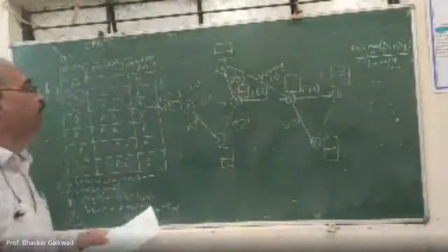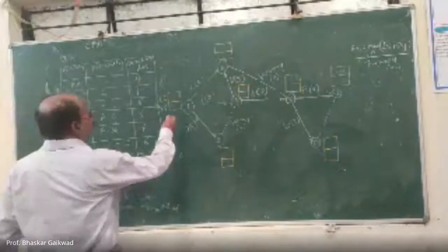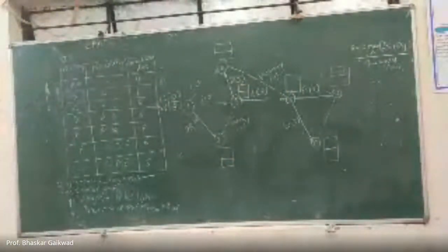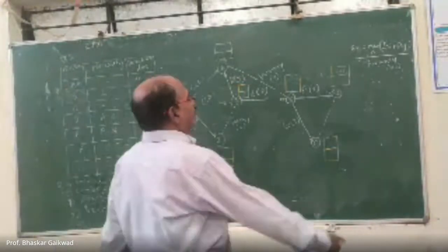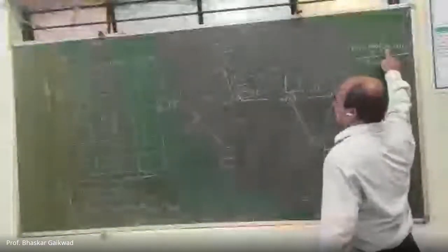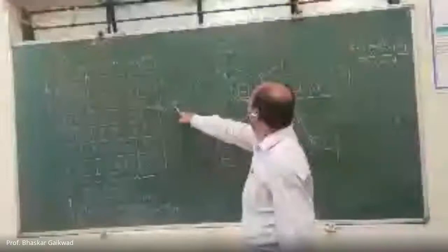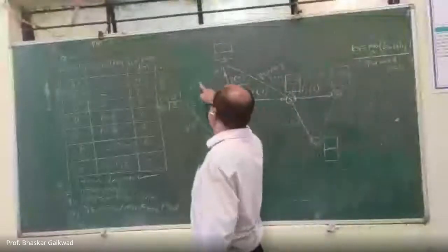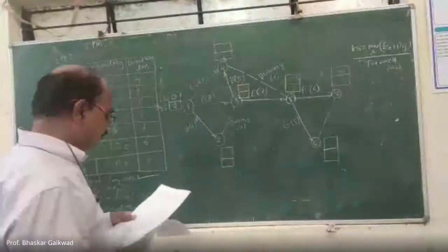Initially here it is 0, 0 as usual. So we can use this formula. ES of I, which is 0, plus D, the duration, so 6 plus 0. 6 plus 0, how much is that?